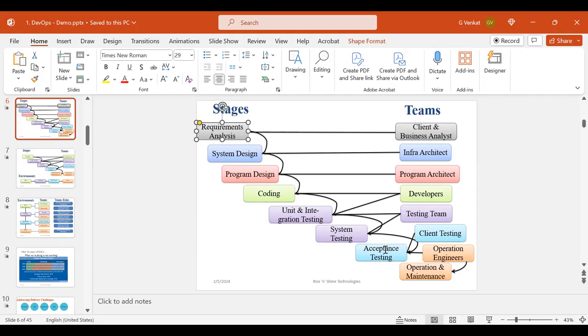Has time been impacted or not? Tomorrow it has to be delivered, but today the client verifies and is not satisfied, and stops it. He is not willing to go for the promotion to production. That means tomorrow's release is stopped. That means time overrun.